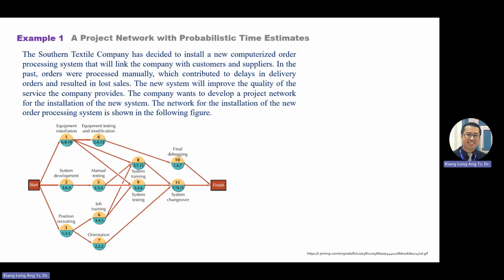Right. Last lecture, what we covered in chapter 4, the keyword is network. There are two types of network, AOA and AON. In AOA, you will have dummy. Okay, you have node and arrow. AOA means activity on the arrow. AON is activity on the node.